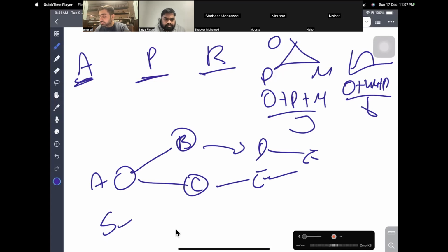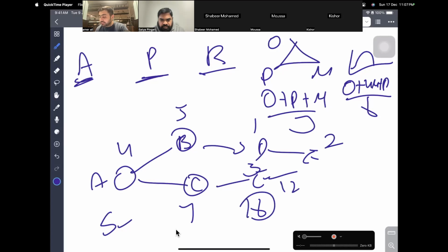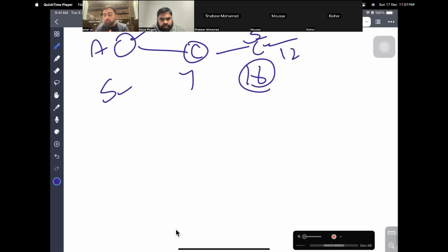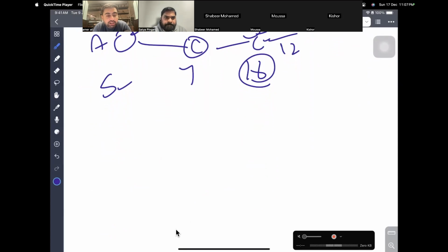Okay, let's say this is 4 days, 5 days, this is 7 days, this is 1 day, this is 3 days, this is 2 days. 4 plus 7, 11, 11 plus 3, 14, 16, this path A, C, E, F. 4 plus 5, 10, 10, 12, 12. So this A, C, E, F is my critical path. The above one is non-critical path. The difference between them is called float. The float is how much the project can be delayed without delaying the critical path. That is your float. A critical path has zero float.